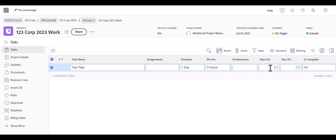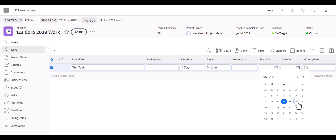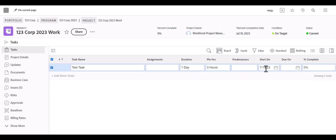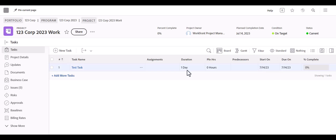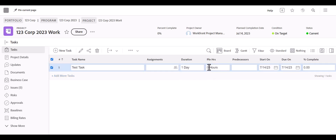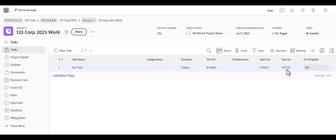Predecessors we'll get to shortly. You can add your start date — I'll just do a simple set to start on Friday. When you click through, a one-day duration has its start and due on the same day, recognized as an 8 a.m. start and 5 p.m. finish. If the estimated hours are, say, eight hours but someone won't spend their entire day on it, you'd want to spread that across two days. The due date will update and account for weekends — for example, jumping to end of day Monday the 17th. That's a quick and easy way to add and assign a task.